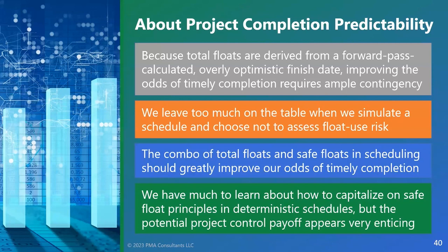If you have Summit, I would say a quarterly revisit of your safe float, safe start calculation is what I would recommend. Also, if you do have a major delay, a major risk that materializes, absolutely, that would be the time to re-simulate your risk and refigure out your safe starts, safe floats. Excellent question.